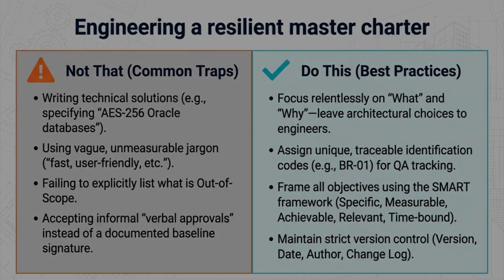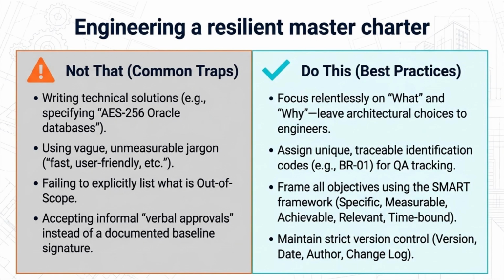To build a resilient BRD, avoid technical solutions, vague jargon, and informal verbal approvals. Focus relentlessly on the what and why. Assign unique traceable IDs like BR01, frame objectives using smart targets, and maintain strict version control with change logs.